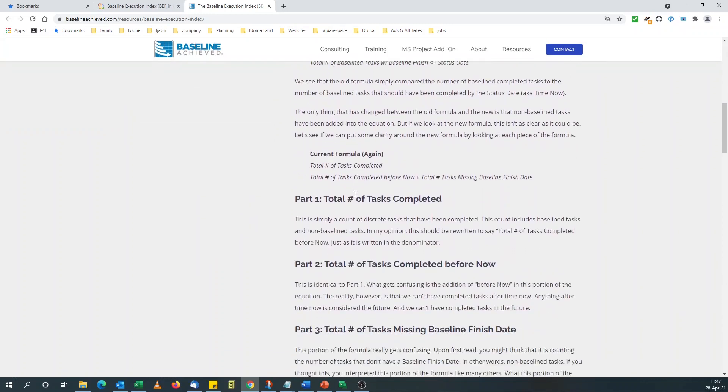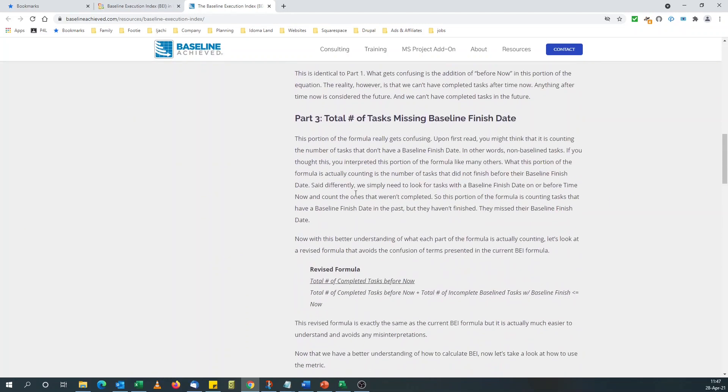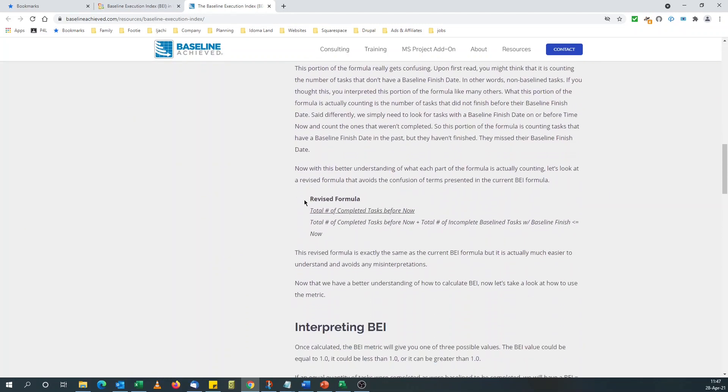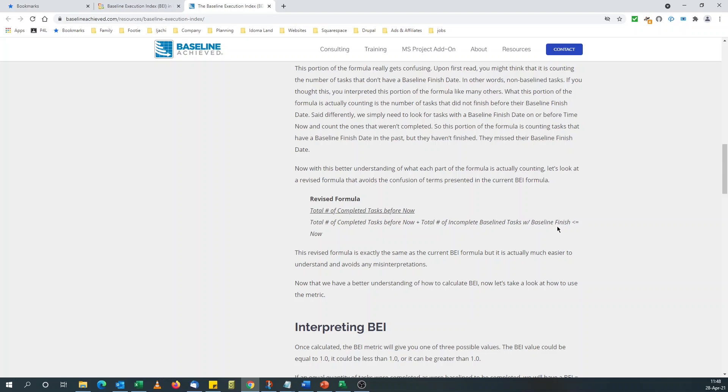The formula I'm interested in is this formula: total number of completed tasks before now, divided by the summation of the total number of completed tasks before now and the total number of incomplete baseline tasks with baseline finish less than or equal to now.